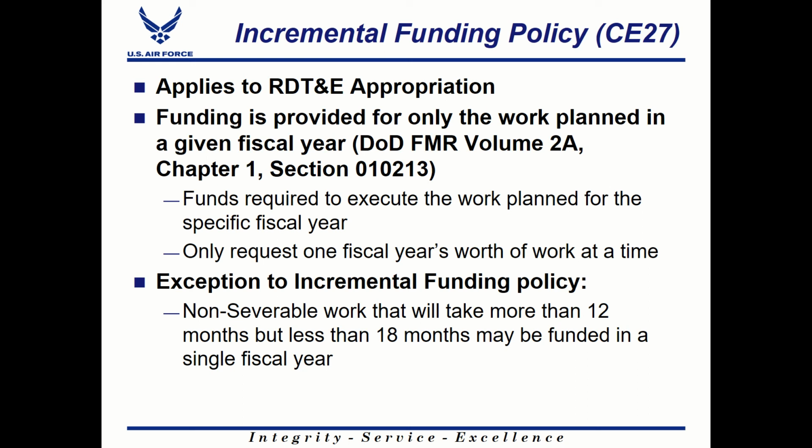So if you had a program or a project that was requesting a prototype be built for some system, and that prototype program was going to take 16, 17 months, you could fully fund or get all the money